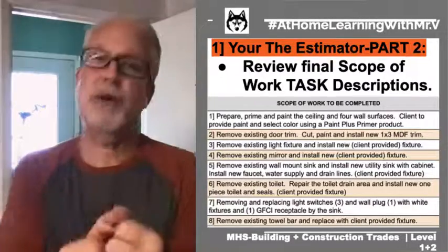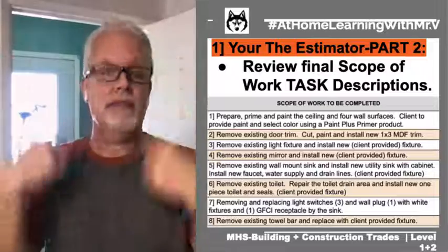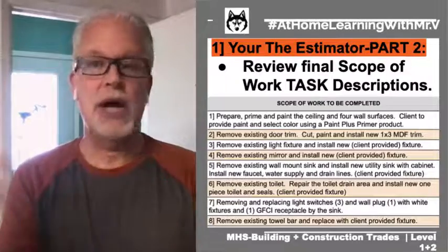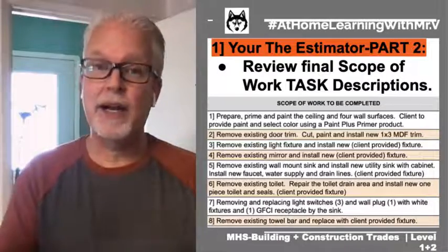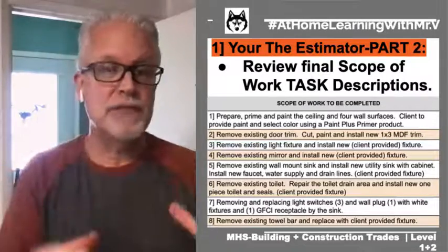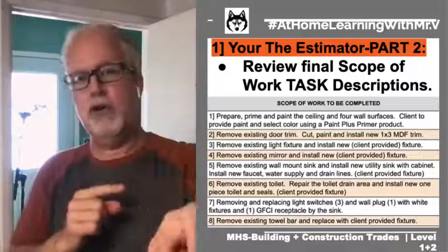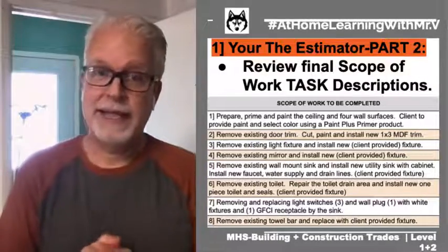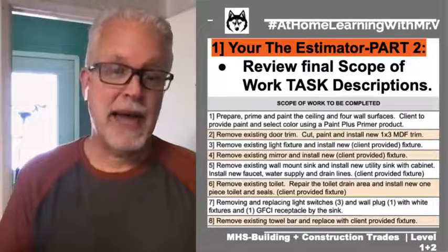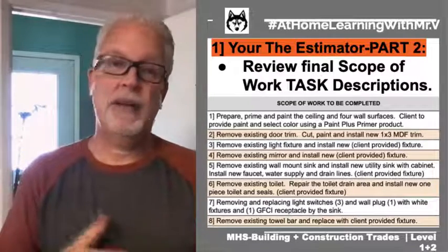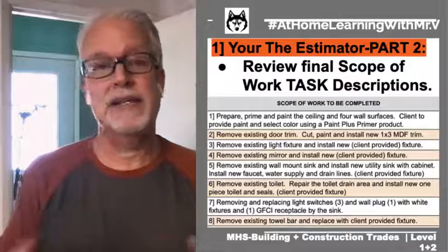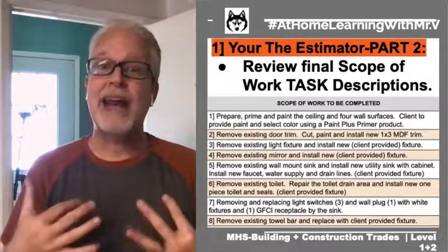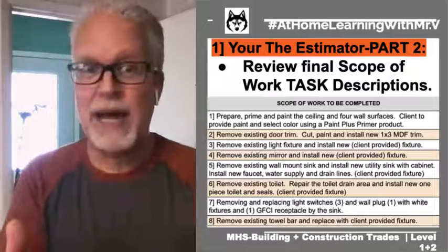And so they have their purchase list separated from the purchase list that I'm going to have, and that's how we keep the project nice and clean and clear on both sides, so nobody's confused, nobody's going, I thought you were doing it, no, you were going to do it. And that usually doesn't work out well, and it usually burns up a lot of time on the calendar. And when we said we'd have it done in 2 weeks, it's now taken 6 weeks because we didn't know who was purchasing what.